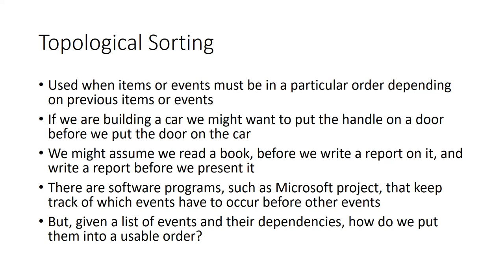In particular, most project software is interested in when the order doesn't matter, when you can do something in parallel. So most of the development of the submarine can be done at the same time as most of the development for the missile. But eventually you get to a point where you want to test the missile from the submarine. And to do that, you need to have both a completed missile and a completed submarine. And so project software would keep track of that.